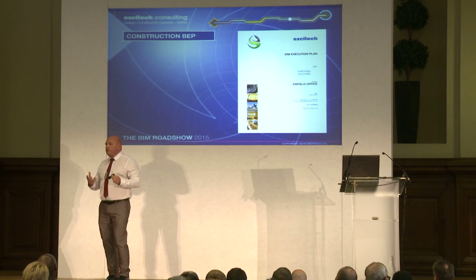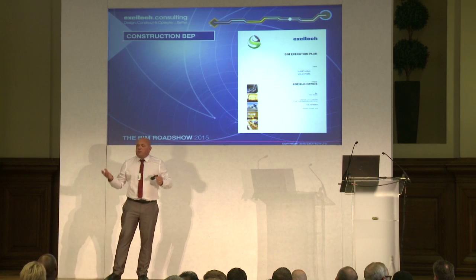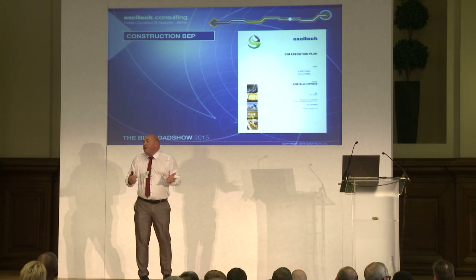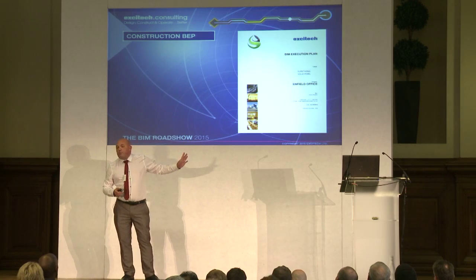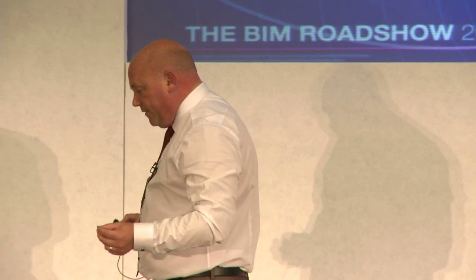We've got to capture things. We've got to capture what paint finish is used, what batch number is used, so we can match it up if we need to. That needs to be documented in there. We need it defined so we know how we're going to deliver it. Formats we're going to deliver the information in. Formats we're going to deliver the geometry in. And all good stuff like that.